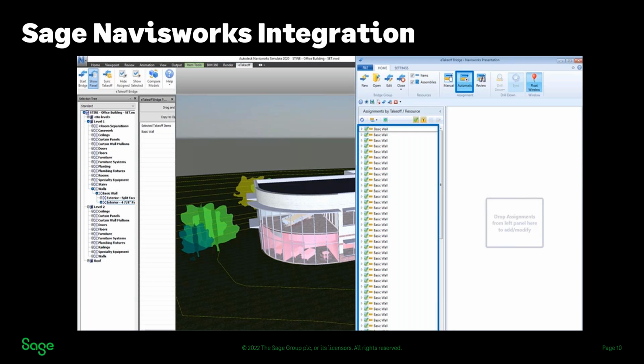I'll get to it. But here's the thing, of course, you have a rendering that you're working with there. This is the bridge that I showed you that connects to the digital takeoff. So it's connecting to both 2D and 3D. Beautiful, right? And what it will do is when I map certain things, in this case basic wall, it's kind of blurry, then it will find all of those basic walls that are in this rendering right here. Okay, great. You click the button and you generate it to the estimate.